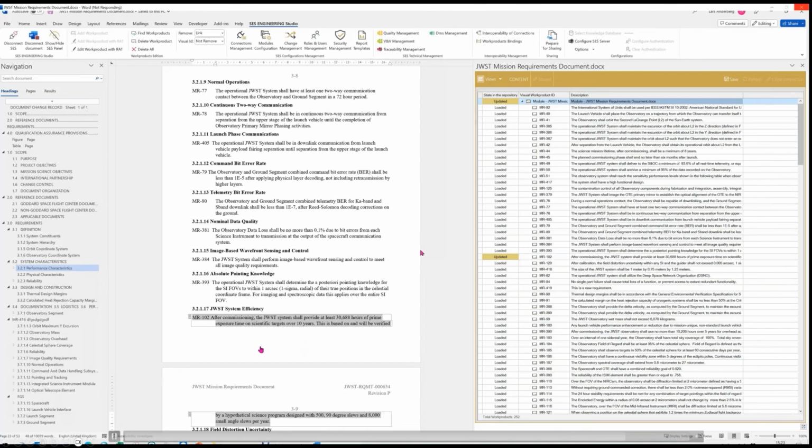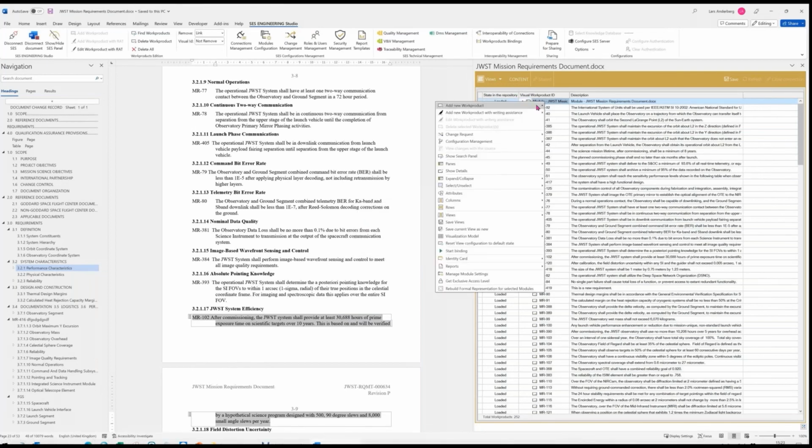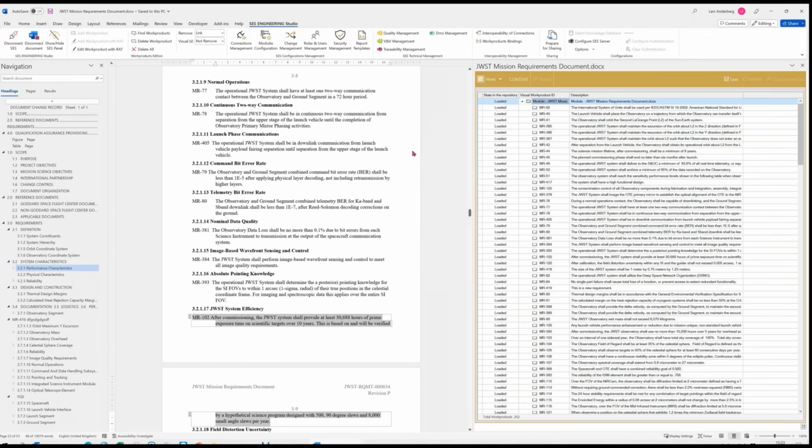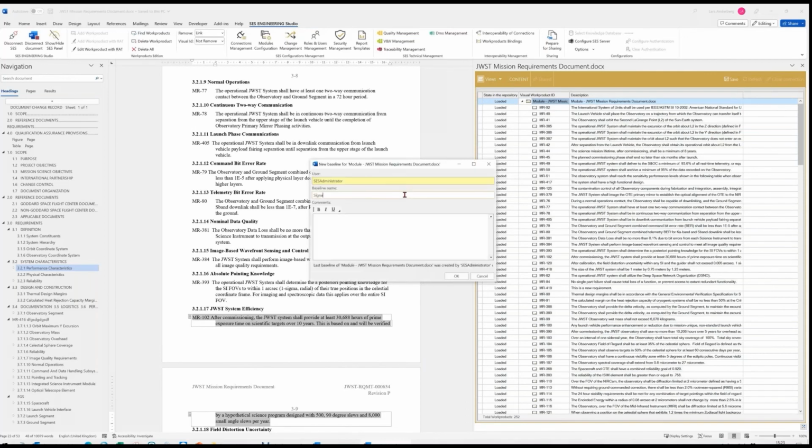Now, when that has happened, we should make sure that we can again trace back to this event in time for future reference. So let's make a new baseline. Create a new baseline now. It was "ready for contract" before, but now it is actually the signed, contracted version of this specification.